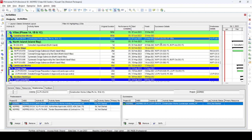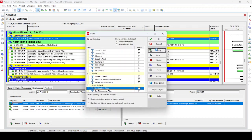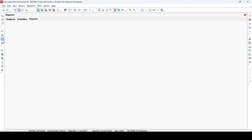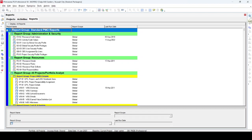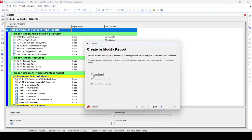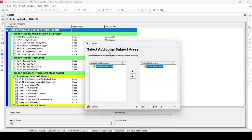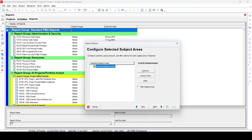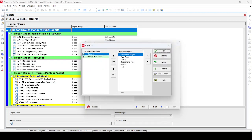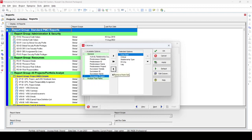Now for Method 3 — the report method — the most reliable method to highlight activities with lag. First remove the current filter to show all activities. Then go to Reports. Click the plus button or right-click to add a new report. Select New Report, then choose the Activity Relationship subject area, then click Next.